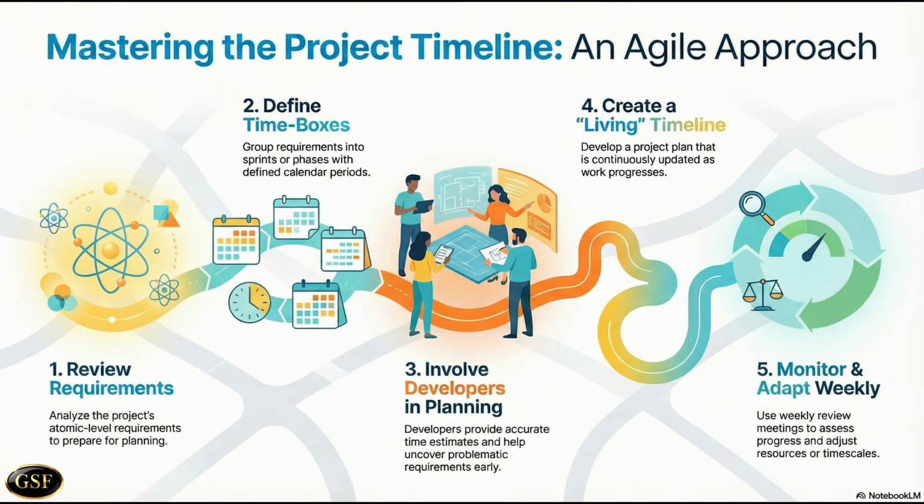At the end of the planning stage, the project manager or their team should be able to put together a timeline for the project, taking into account the time estimated for each sprint or phase. This project plan timeline will be a living document, being updated as the project progresses, and a measure of whether the project is on time or running behind.